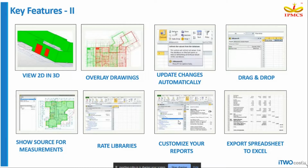One of the more time consuming aspects of manual takeoff is inputting your gathered data onto a spreadsheet. It can be a laborious process and it's easy to make mistakes if you are not paying close enough attention. Linking between takeoff software and spreadsheet eliminates the need for bulk manual data entry. Software users can simply drag and drop measured dimensions into a spreadsheet. The beauty of live linking is that any subsequent changes made to the dimensions using your software are automatically updated on the linked spreadsheet. It saves you the effort of going backwards and forwards between your takeoff and spreadsheet, ensuring everything is up to date.